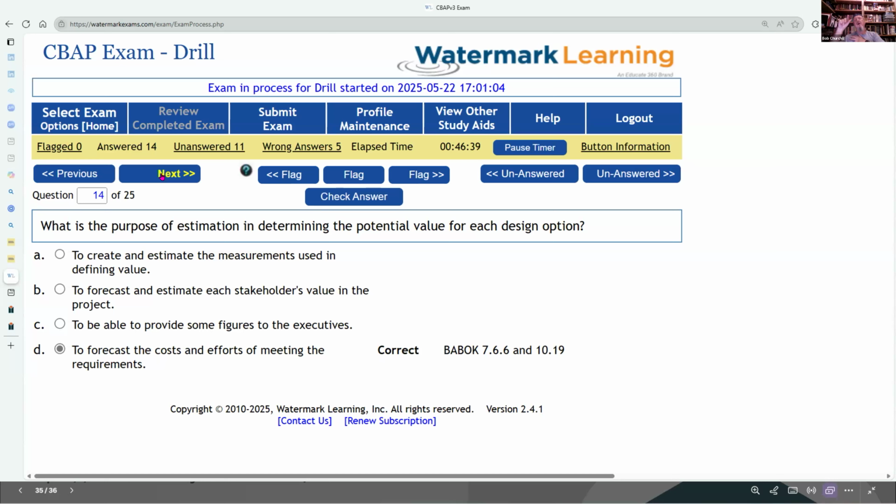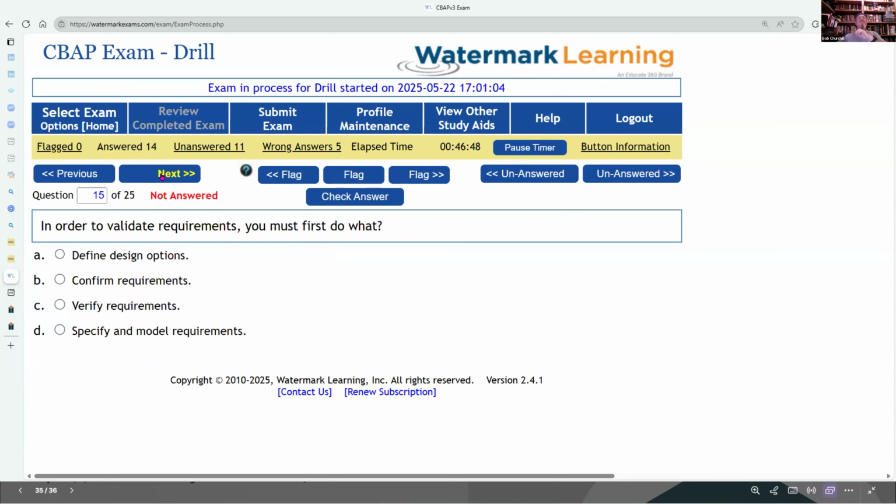And kind of the thing you're saying about not using numbers is if you use a Fibonacci technique, which means the bigger you get, the bigger the jumps are. That's not quite numeric, but it's kind of an elegant verbal way of thinking about it.